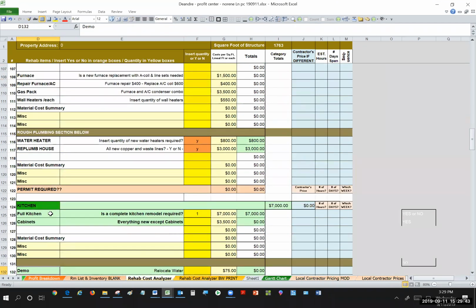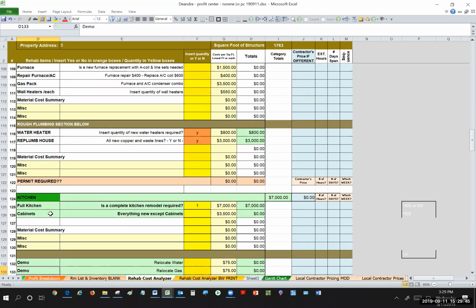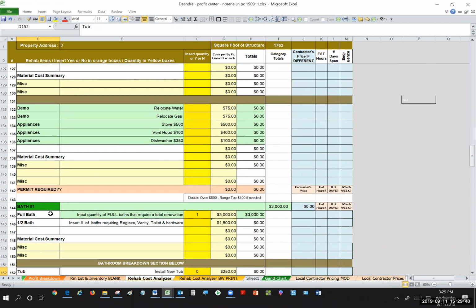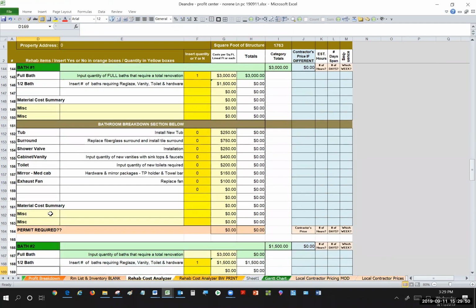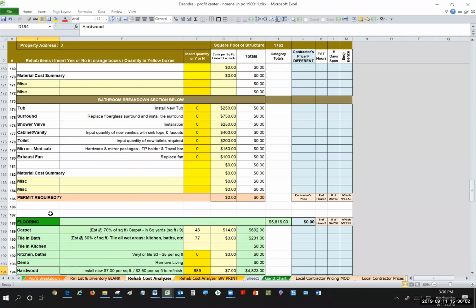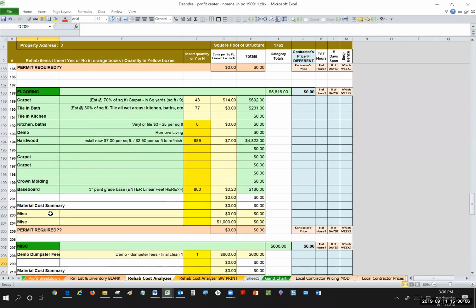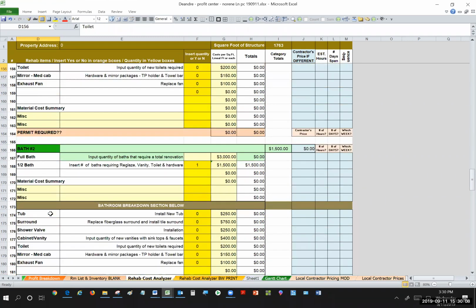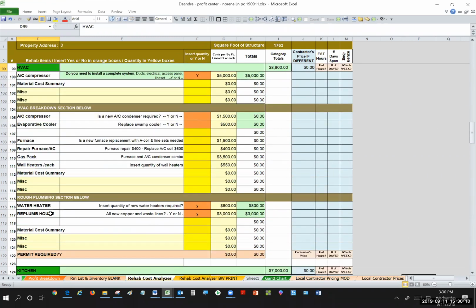You see every one of those dark green headings, including the kitchen, and now including bathroom number 1 and bathroom number 2, which, as long as we have enough guys on the crew, we could work on simultaneously. And probably we should. One crew should do one bathroom and one crew should do the other, as long as they're maintaining code and quality. Here's flooring. So these are the dirty dozen, and that's why this little breakout can be very, very helpful.